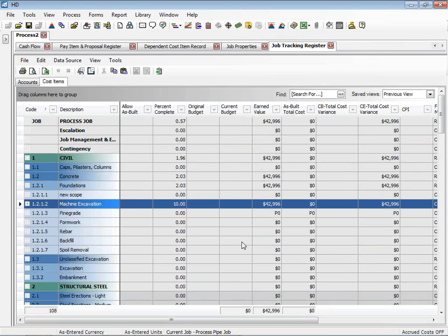That's just for that item, and it rolls back into this main register, where we can look at that same kind of information across all the items, whether we're looking at earned value. We could of course turn on columns to show actual man hours versus expended man hours, forecast, and other information. So hopefully that answered the question around progress. It sounds like it was pretty thorough.